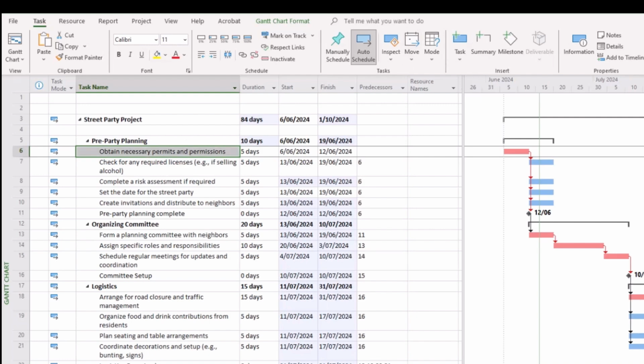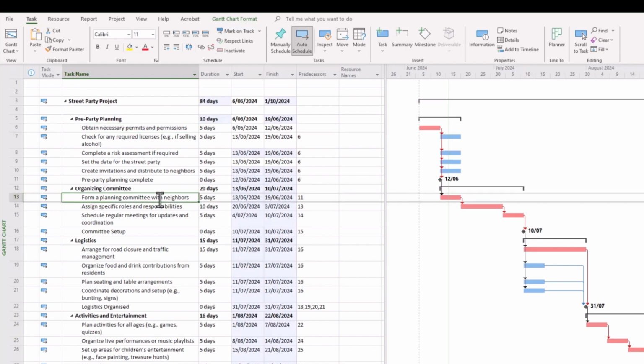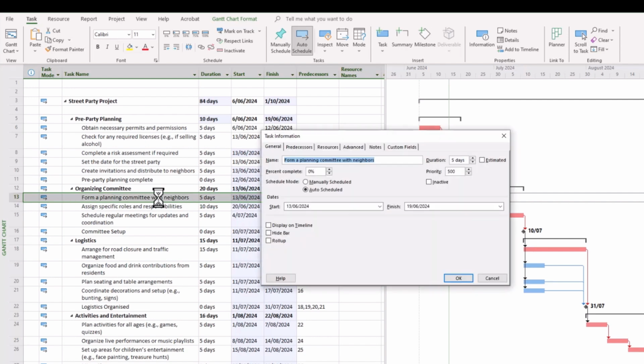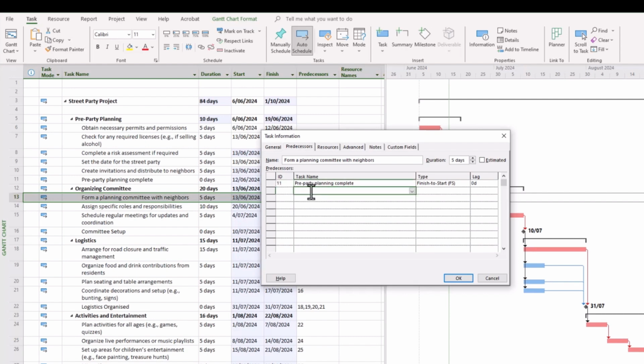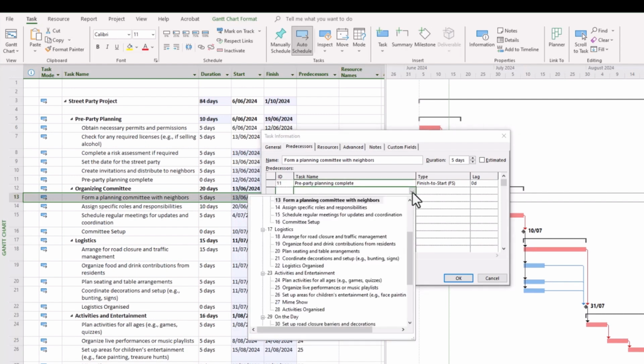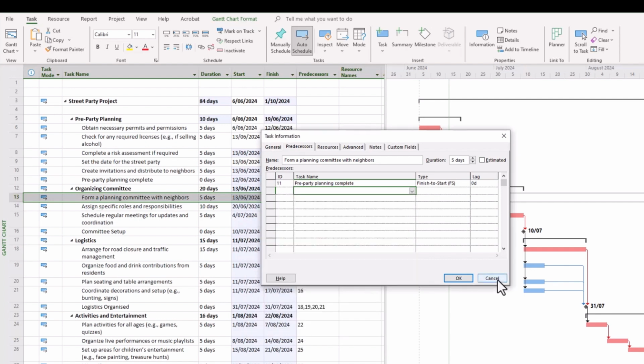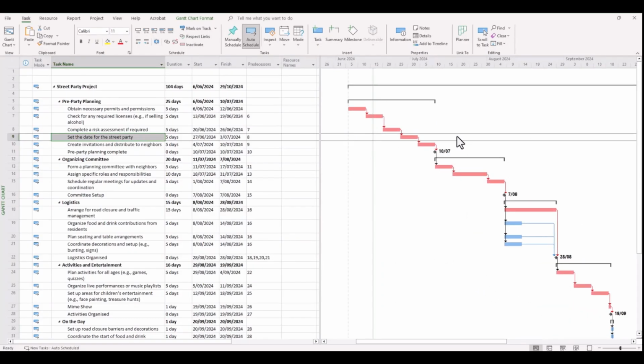Another method that can be used also is by jumping into the project task detail. So you click on the task that you want to look at the prerequisites, double click, and a dialog box with task information will arrive, and then you can also look at options there in which you'd like to change your prerequisite. So that's another method. It's a slightly longer method compared to the previous two, but it's certainly available at your disposal if you wish. Another method in linking and unlinking is a manual method.